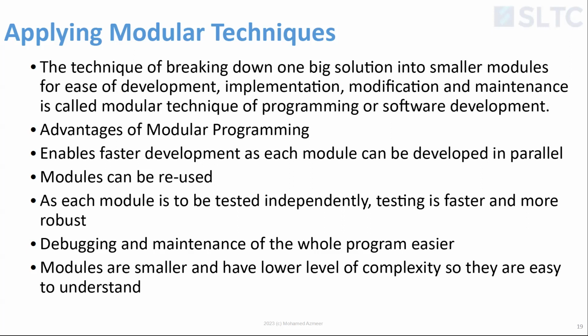Multiple teams can work at the same time, each tackling one module or one problem. Let's say 5 teams are building 5 different modules. Another big advantage is that every module can be tested independently. One team can work on its module and test it independently, while the other teams are busy building and testing other modules.